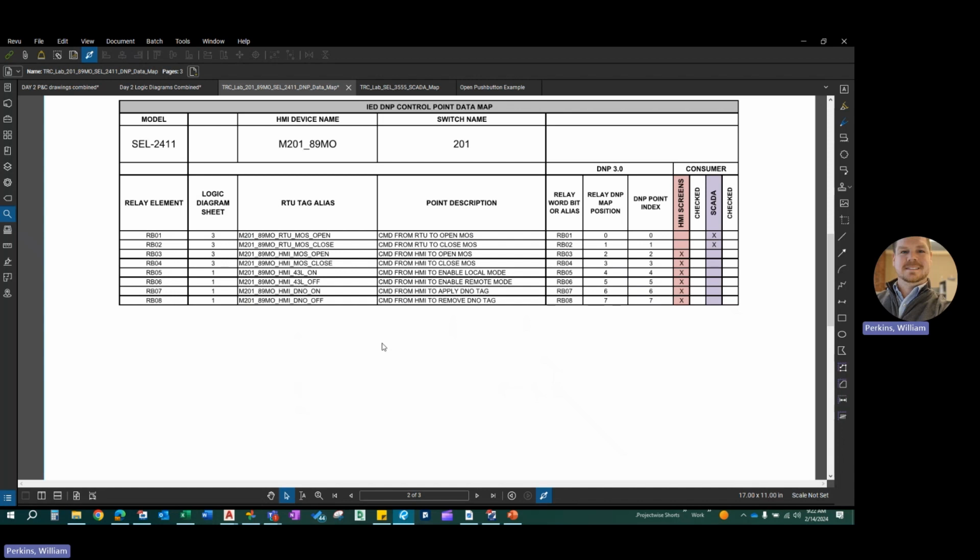And as I'd mentioned on the binary status, the A&I commissioning engineer will do the same when they're testing this. They'll make sure that everything is highlighted, and when a point is tested and commissioned, they'll put an X, to confirm that every point was properly tested to the control center.